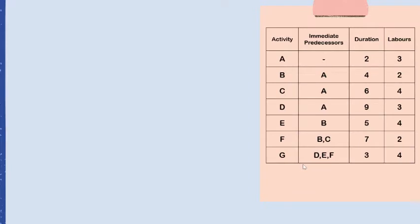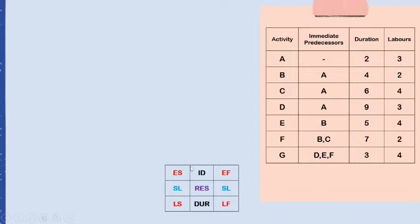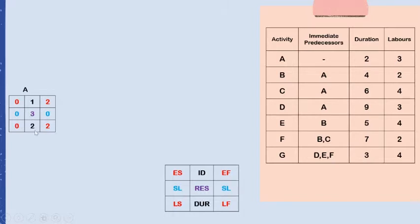Now we will construct the project network diagram. Based on the table on the right side, we can get all the information about the project. We start with activity A because it does not have any predecessors. So the earliest start of activity A is zero, the duration is two, and the earliest finish is day two, calculated from earliest start plus duration.